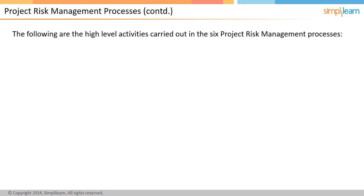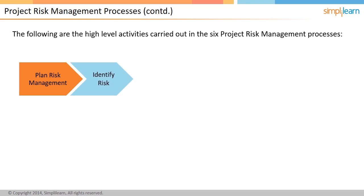We will now look into the high-level activities carried out in the six project risk management processes. The first process is plan risk management, in which you define the scope and objectives of the project risk management processes. The key output of this process is the project risk management plan. The second process is identify risks, in which you identify the maximum possible known risks. The key output is the risk register.